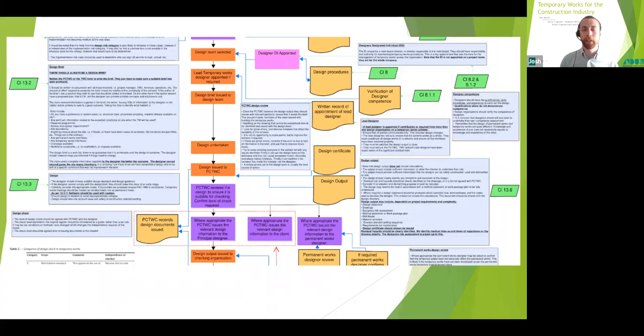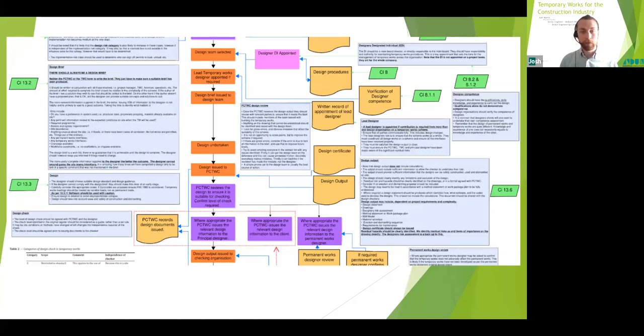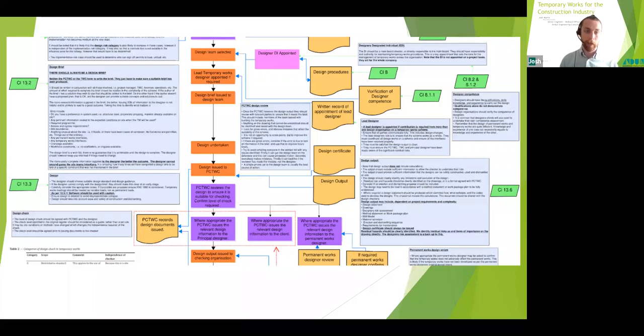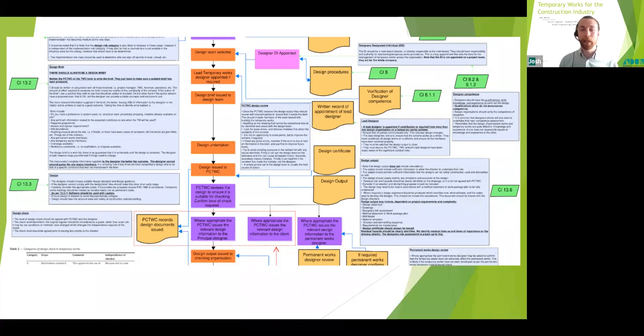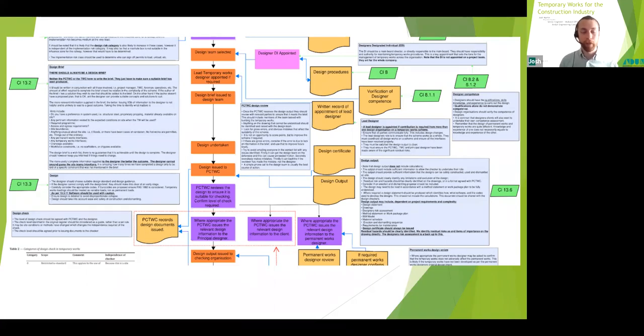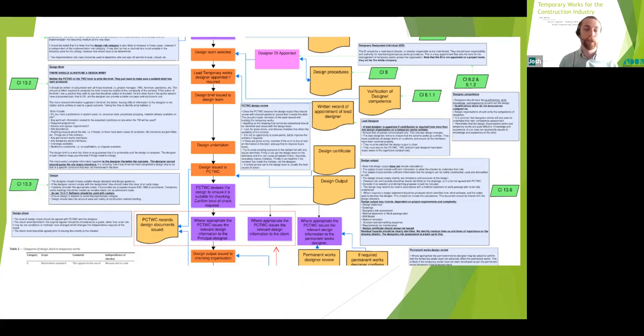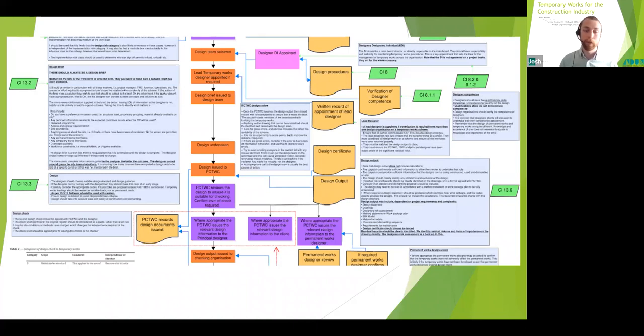The next formal stage is the review of the design by the TWC. During this stage, it is important that the TWC reviews it against the brief and ensures that it conforms with the brief. If it doesn't, then feedback to the designer with a sense of, well, this wasn't what I asked for. Similarly to buying a new sofa and a wooden chair turning up, you think, that's not what I ordered. That's not what I put down on the requirements. So provide this feedback to the designer and make sure the design fits the brief. It is genuinely great for us to get feedback from our clients and to find out if what we had envisaged and designed did the job it was meant to do. This is how we all get better at what we do, with constructive feedback holding the most value, in my opinion.